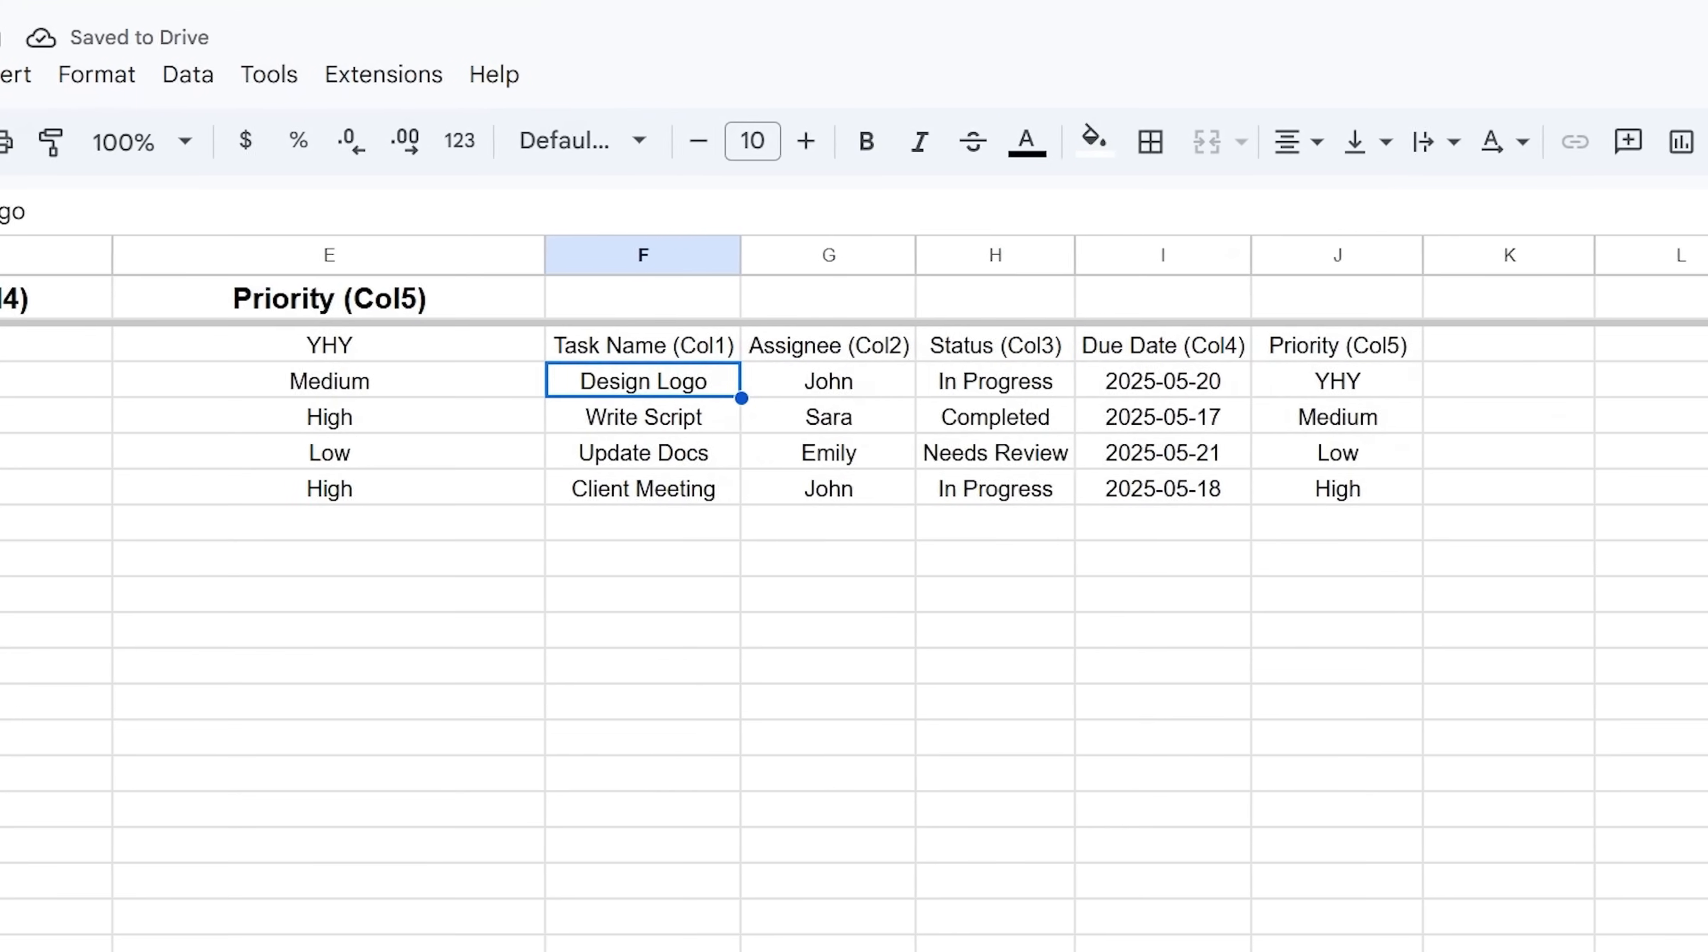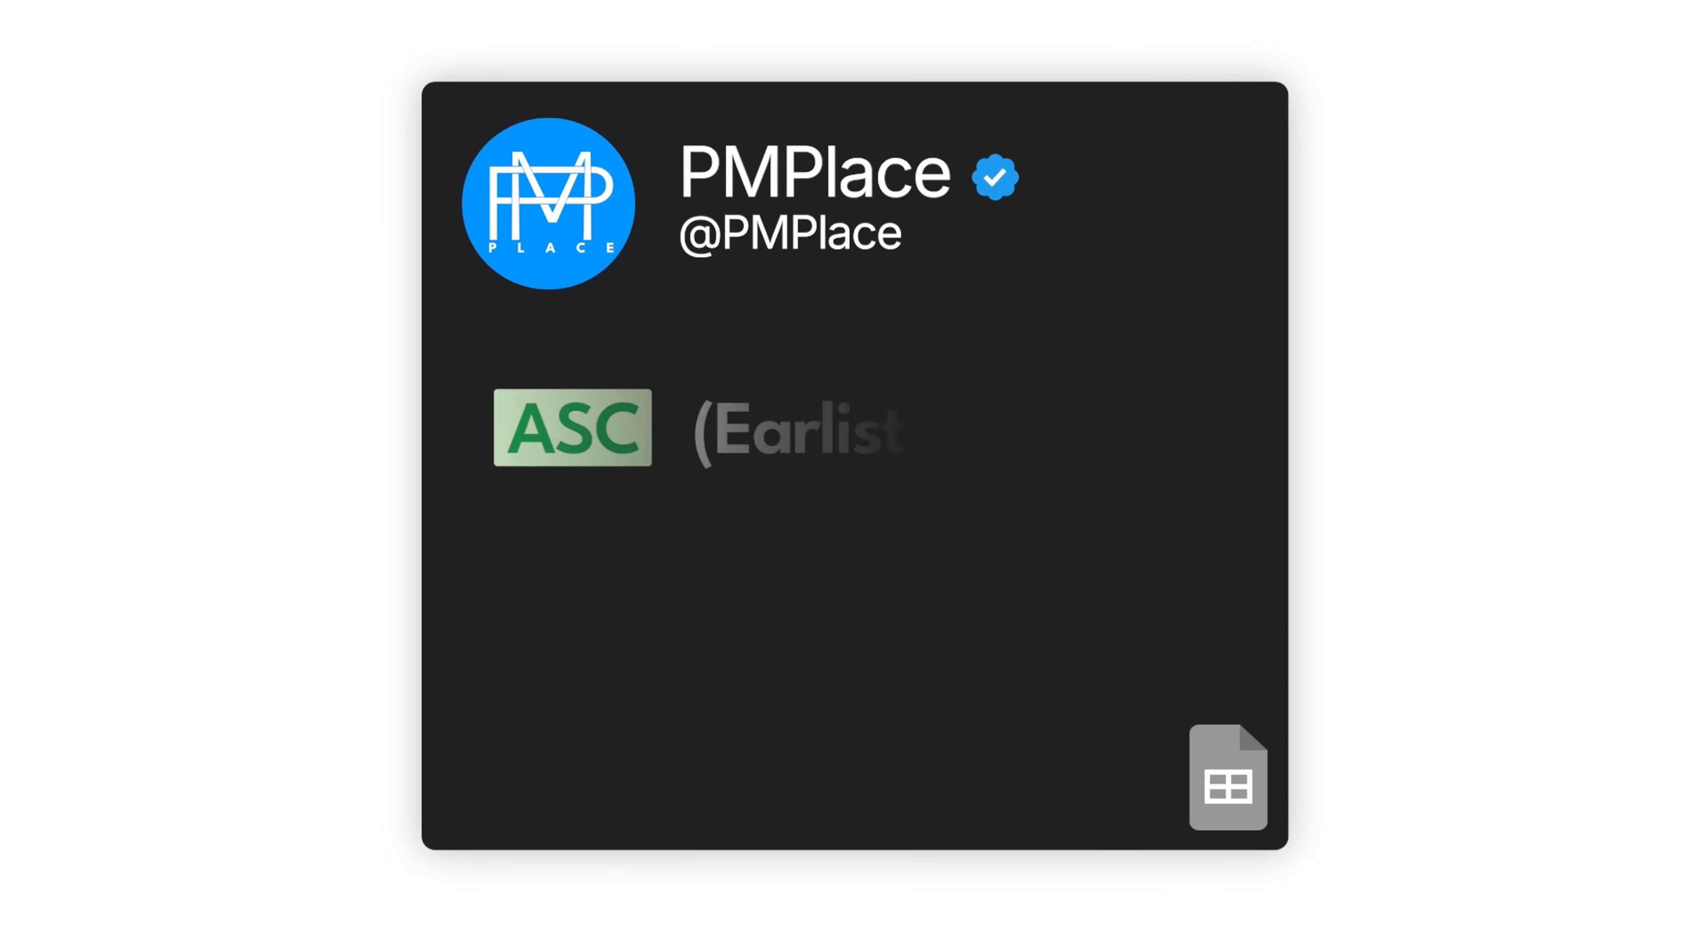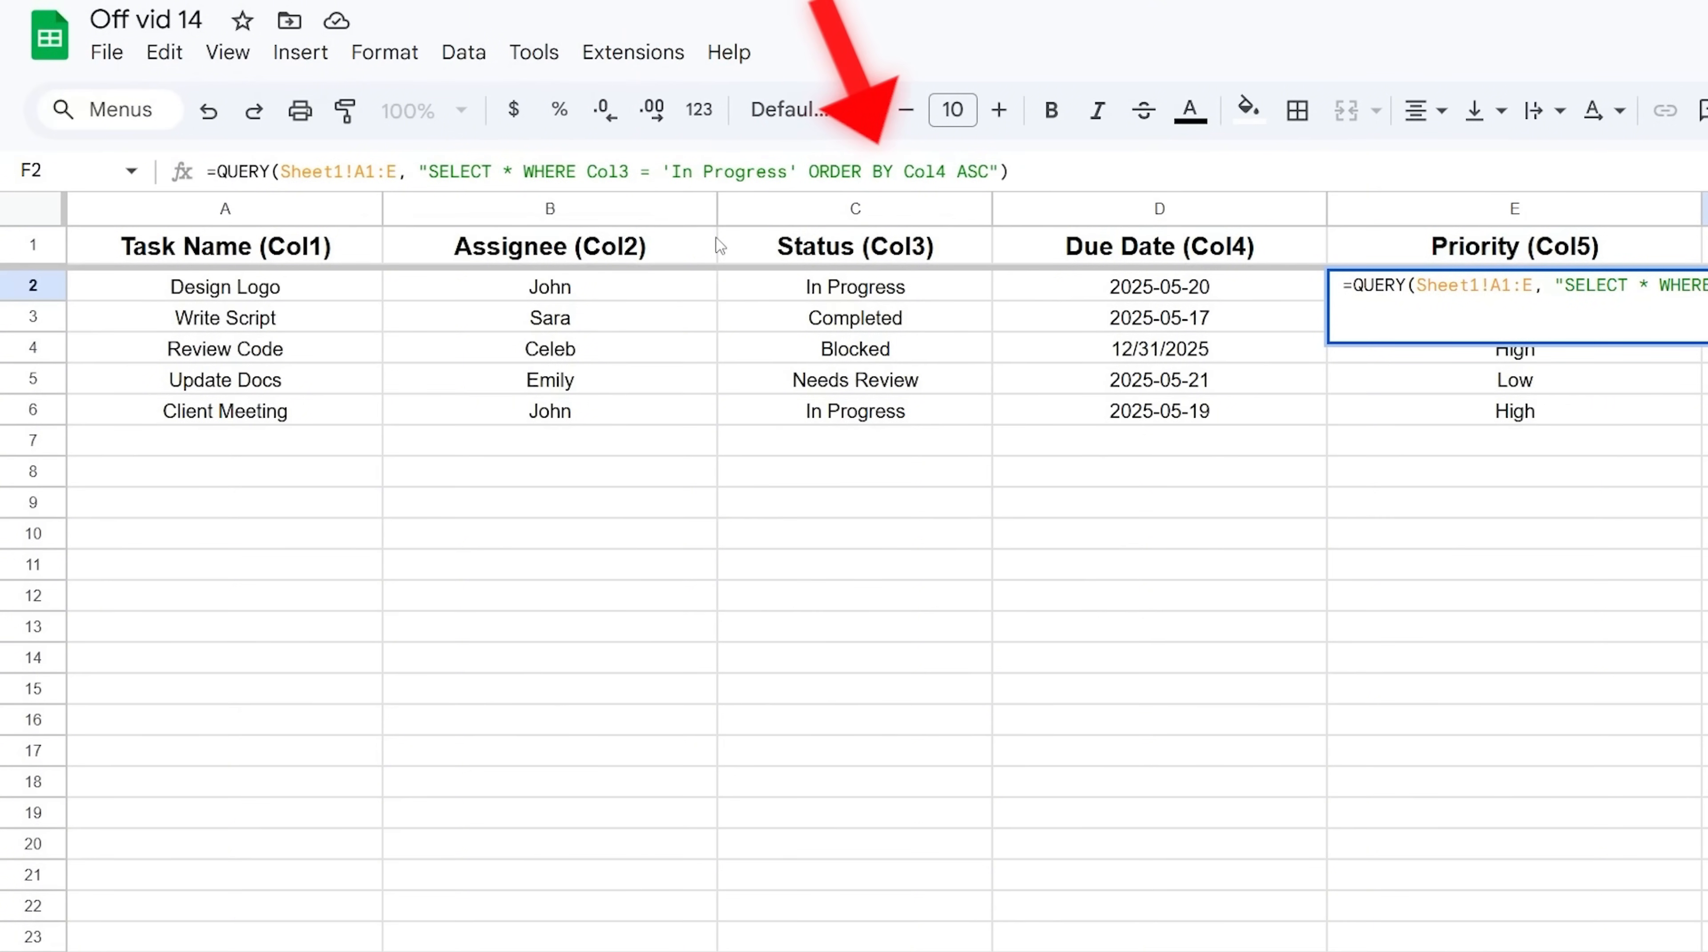You can even make the date dynamic, like showing tasks due in the next seven days, though the formula gets a tiny bit longer. Finally, you'll often want your results sorted. That's the ORDER BY command. You pick a column and say ASC for ascending (like earliest date first) or DESC for descending (like latest date first). To sort your filtered tasks by due date (Column 4) with the soonest ones at the top, you'd write: SELECT * WHERE Col3 = 'In Progress' ORDER BY Col4 ASC.